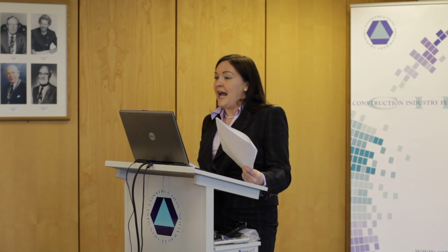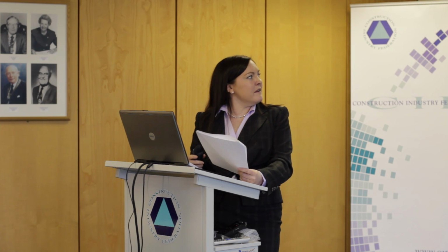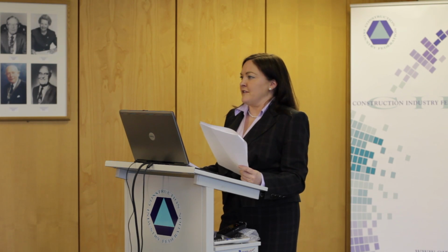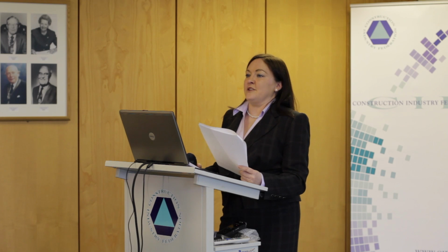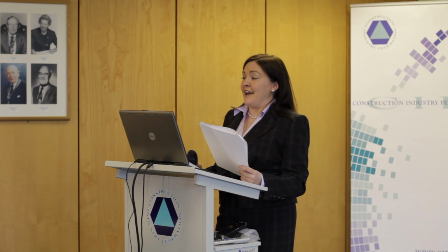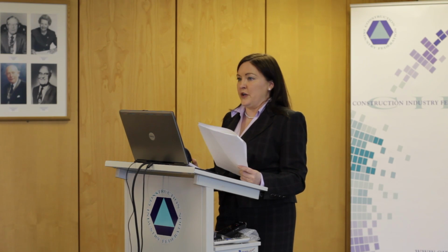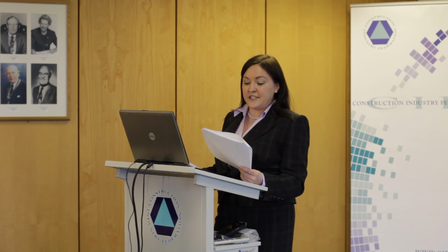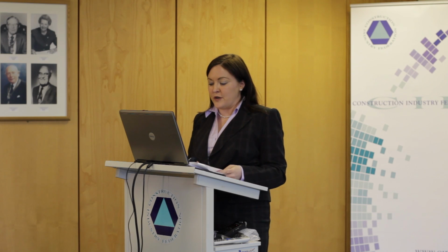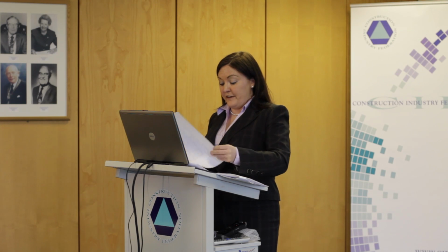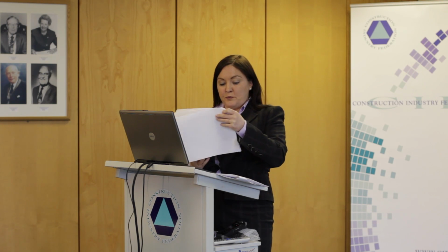It actually amazes me how shy contractors can be about relying on the fact that it was unforeseeable, because the whole thing about it being an experienced contractor, there seems to be a feeling out there that you should have sort of known about it or something. The time of tendering is the crucial thing. If it was in any way unforeseeable at the time of tender, make a claim, and certainly if in any doubt, make the claim, put in the claim for a compensation event, because if you don't, you lose all entitlement to it, whereas if you do, you at least have some chance of getting it. So as I say, it's one that contractors don't rely on enough, and I don't know why actually, because I think it's fairly obvious, it's a fairly easy thing to prove a lot of the time.